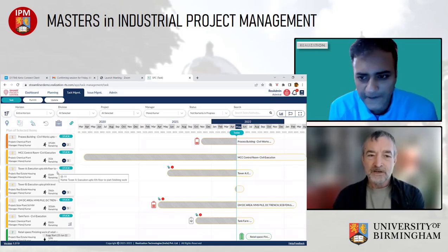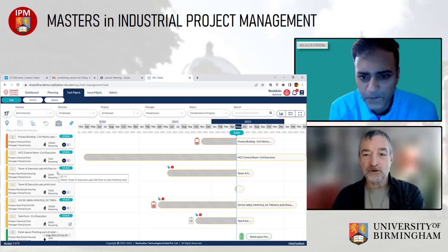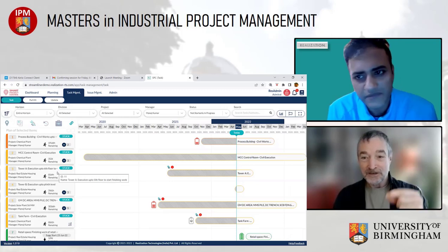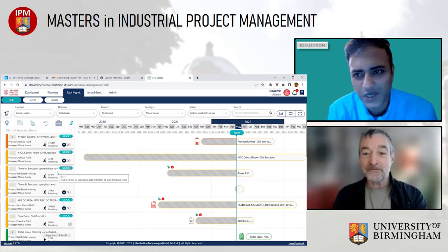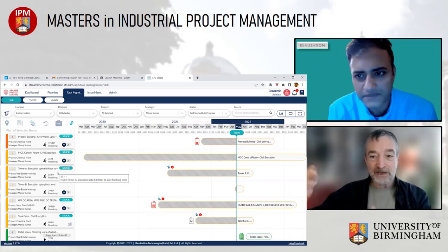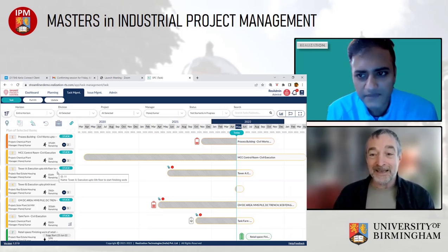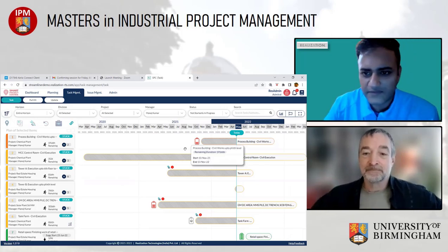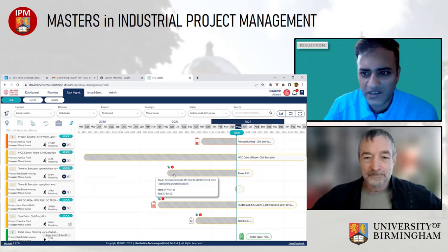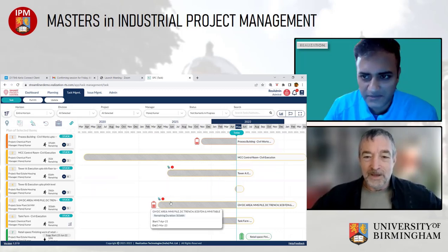Okay. And if it's a single resource, then they just work on the first one, focus and finish, then the second. One rule. Yeah. If it's a team manager, they just make sure that whatever size their team is, they are working these priorities. Yeah. So load here, if you have balance, load here. If you have balance, load here. When you run out, just leave it. Yep. They have to wait.